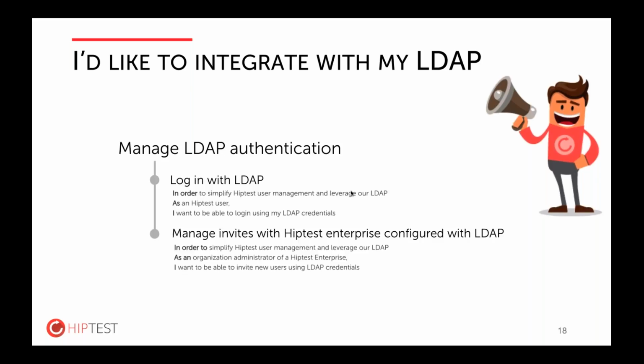Well, at the end of the discussion, between myself, the marketing, the developers and testers, we ended up with 2 features. We have to enable login with LDAP, but also manage invites within IPTest to invite other users that are configured in the LDAP. So not 1 but 2 features, and we also ended up with 8 scenarios instead of 3.